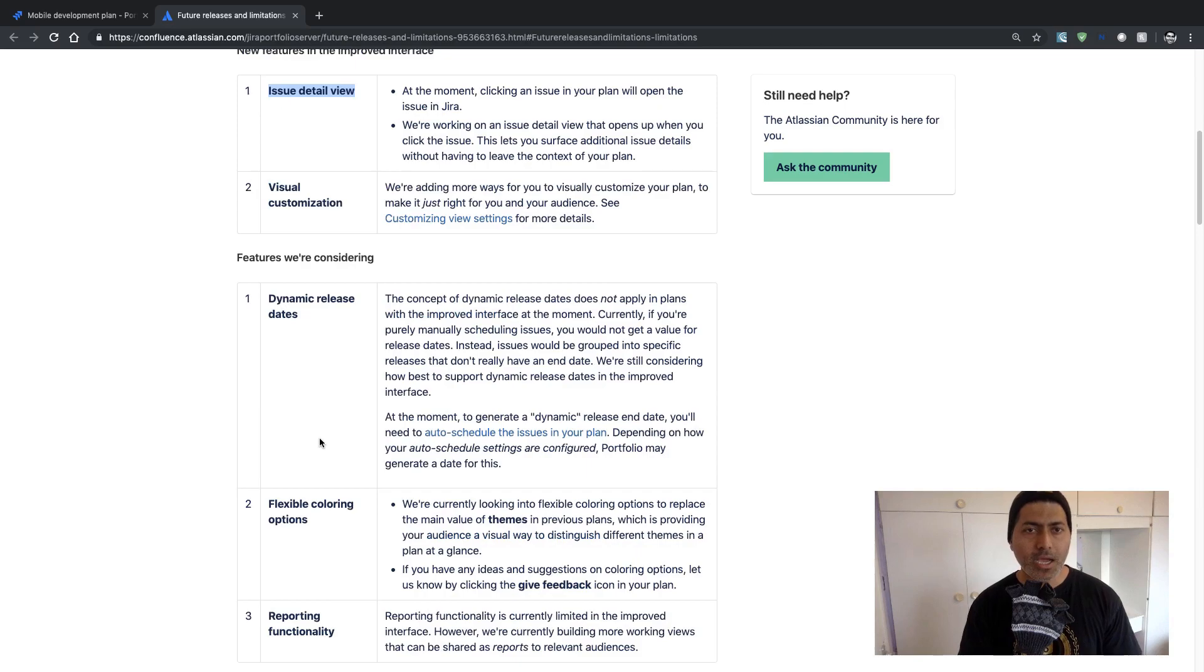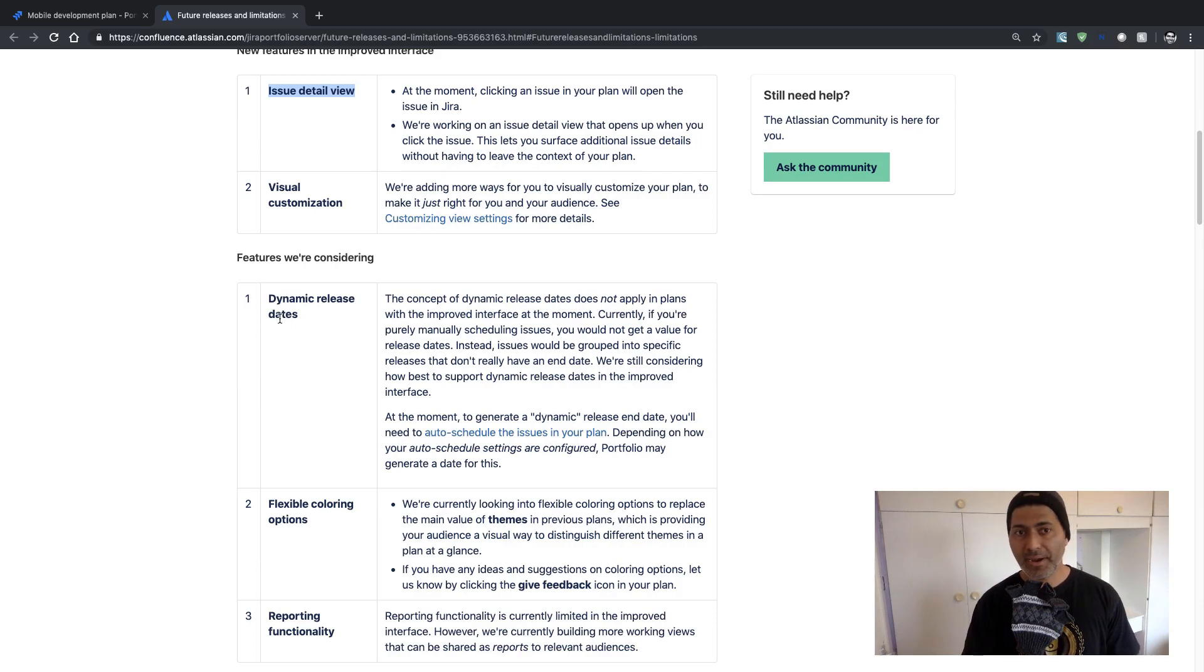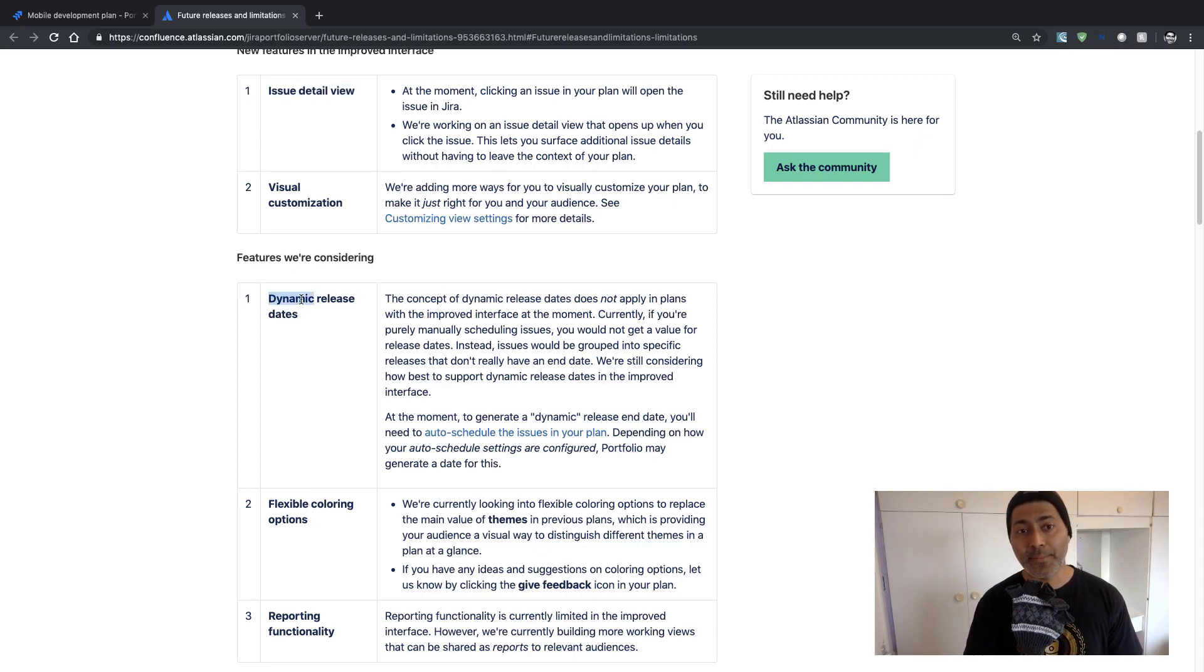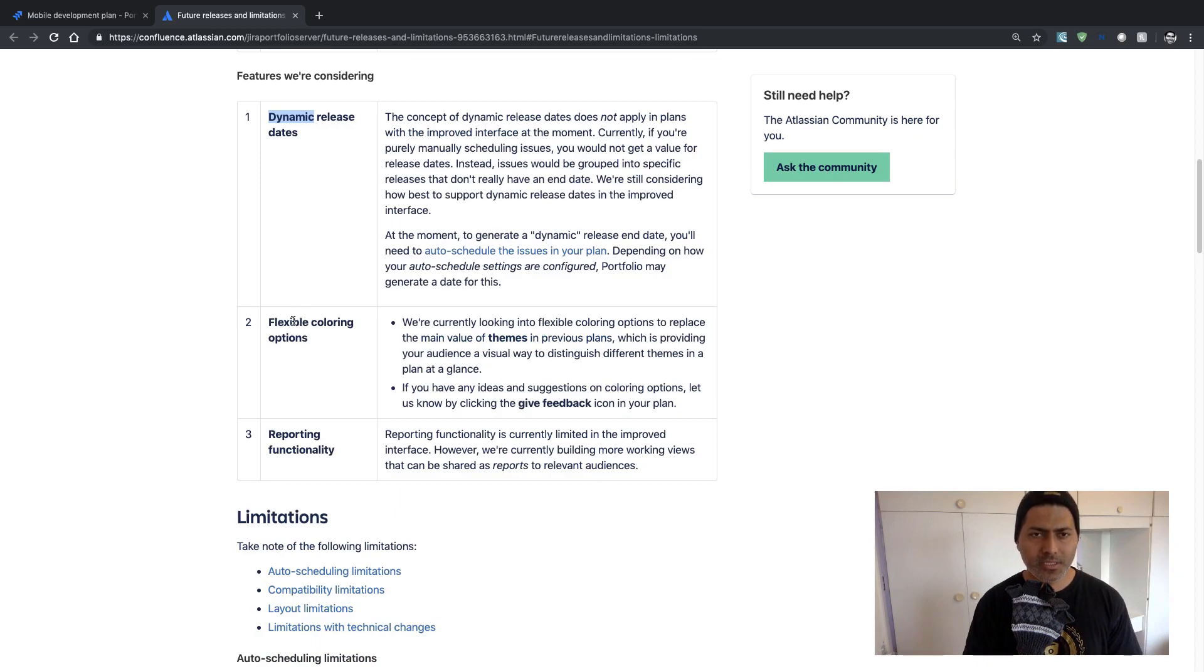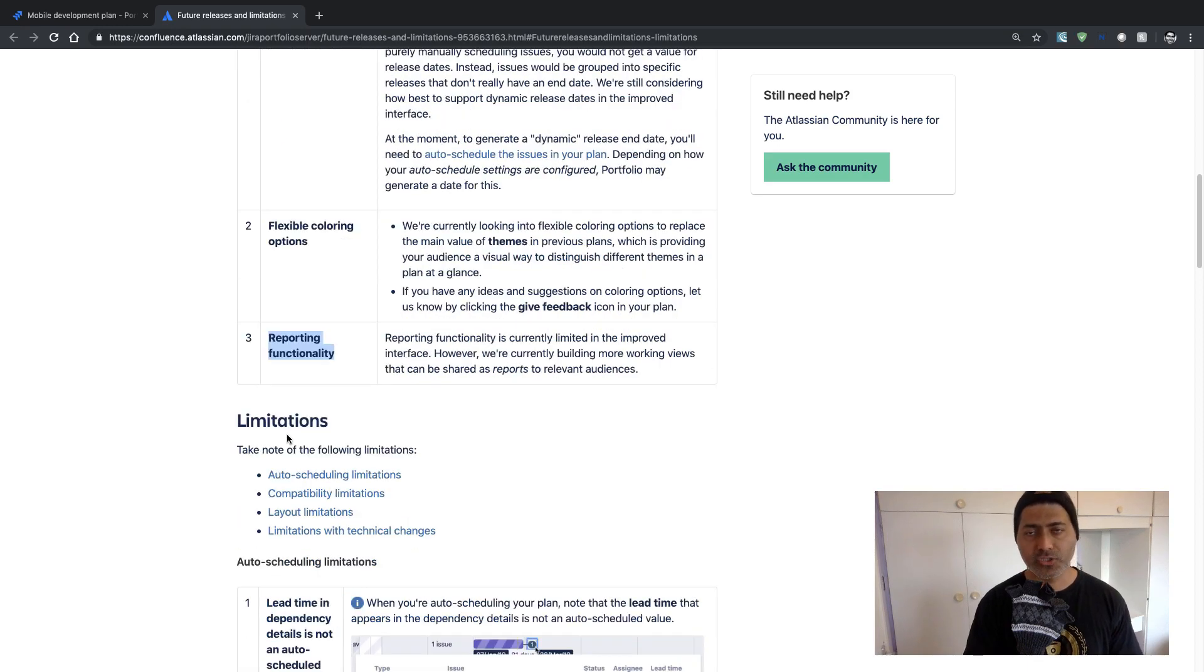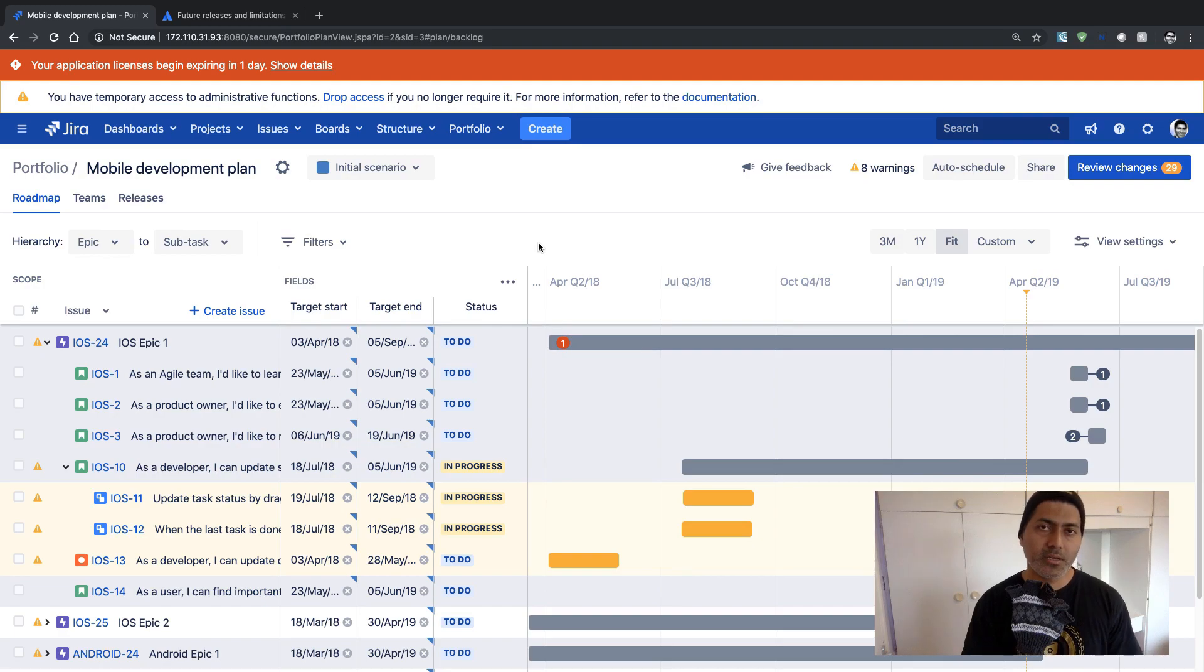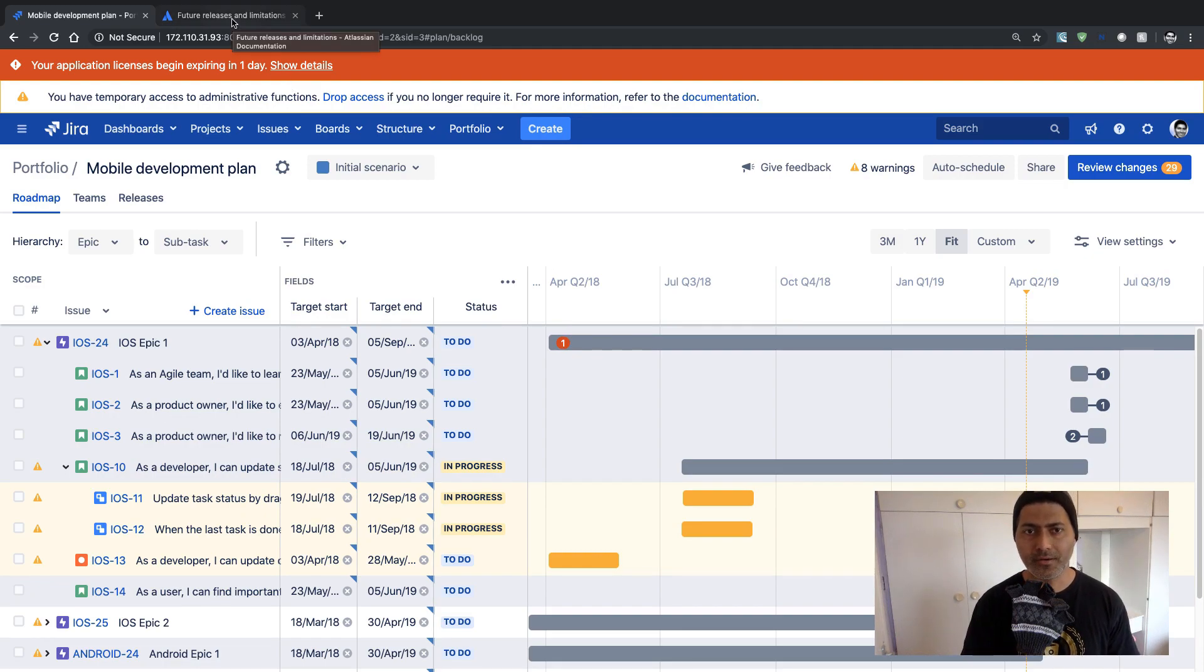But there are some other things that you need to be aware of that are probably not there and they might not bring in those new features. So first of all there is no concept of dynamic release dates that you might be familiar with in your old portfolio live plan. There is no way to do flexible coloring options. And I was actually looking for the reporting functionality which is not there. So there are some useful reports in the old portfolio version like capacity management, dependency report, and there are some other reports that are quite helpful.